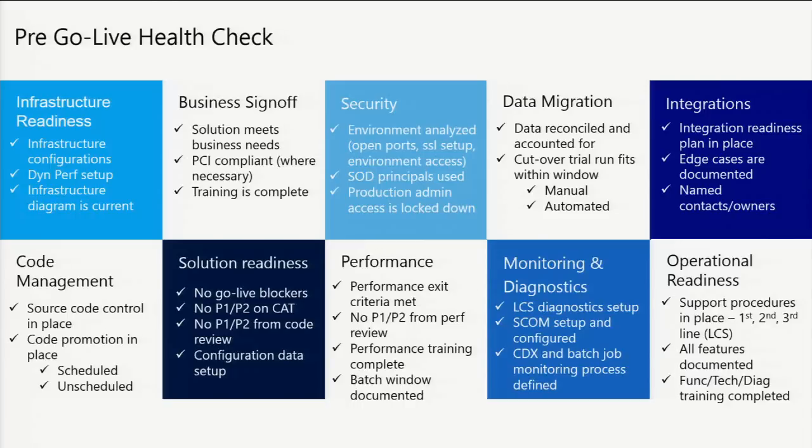What we're talking about is this: it's inevitable that you're going to find issues when you're in production. But do you have the process well defined for how you're going to take those changes in on a regular cadence? We see people taking in changes every day. It's an absolute disaster for the customer when you're taking changes on a daily basis because you're not actually testing properly. You end up creating more difficulties and then having to roll back. Well, do you even have rollback processes in place? You end up tripping over each other. So you need to be very disciplined about having a regular cadence up front.